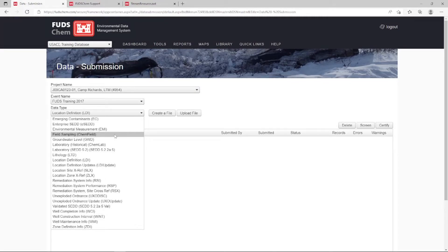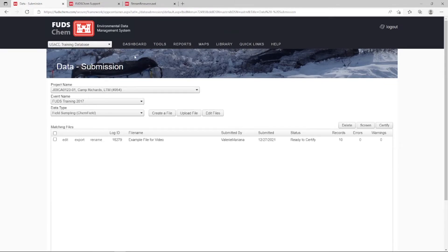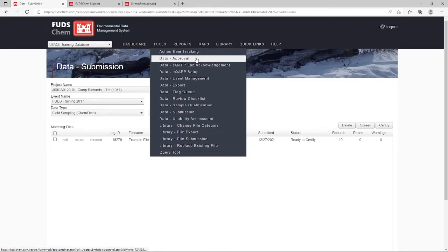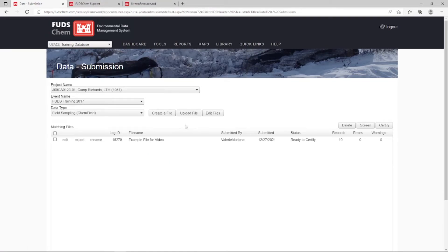Once your sampling event starts, data can be entered simultaneously, and event tracking reports will update in real-time to ensure no planned samples are skipped. We recommend that field data from your completed chains of custody be entered within seven days of the end of sampling. However, your project may require a different timeline. Like location data, field sampling data will be entered under Tools > Data Submission and approved under Tools > Data Approval. Refer to our Field Sampling Chem Field Entry tutorial for more information.